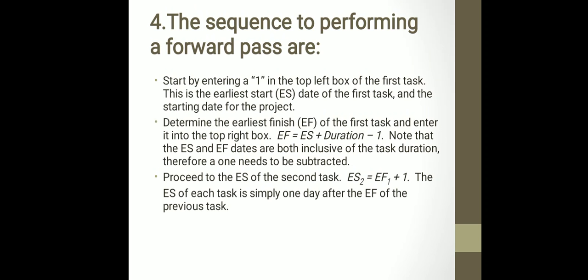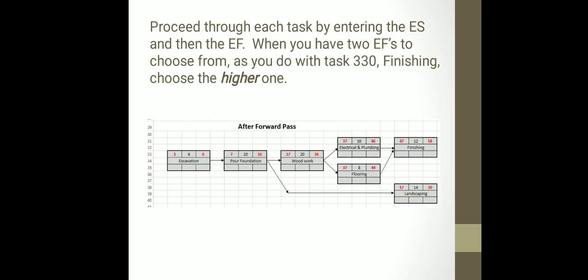Proceed to the earliest start of the second task, that is, earliest start 2 equals early finish 1 plus 1. Proceed through each task by entering the early start and early finish.